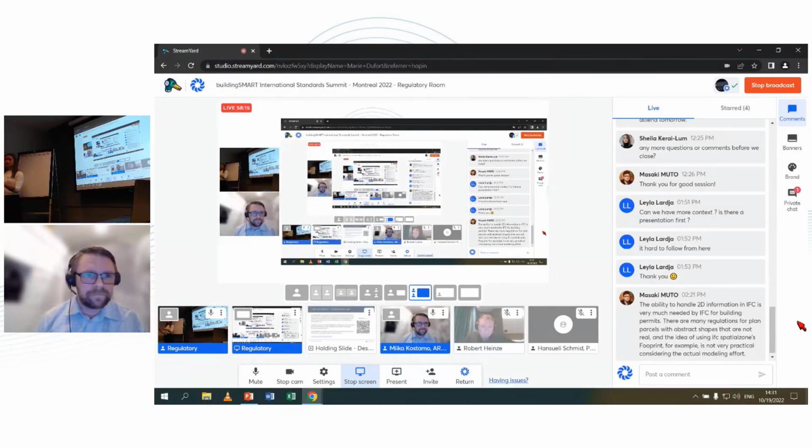But then the challenge, especially in airport environments, is that they're constantly changing. When a project delivers, literally the next week something can be changed. We are not updating those printed cards every week; that only happens twice a year. So there's a lot of discussion, because we cannot guarantee to the fire department that they have the most recent drawings, which for the fire department is not even that big of a deal because they're very aware of the changes in the surroundings.